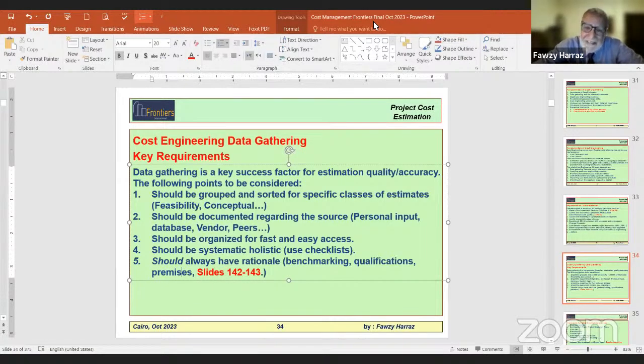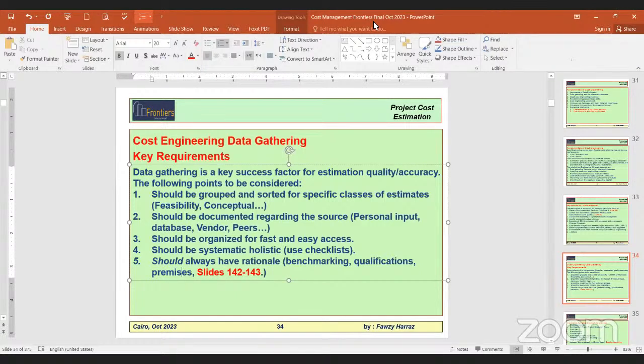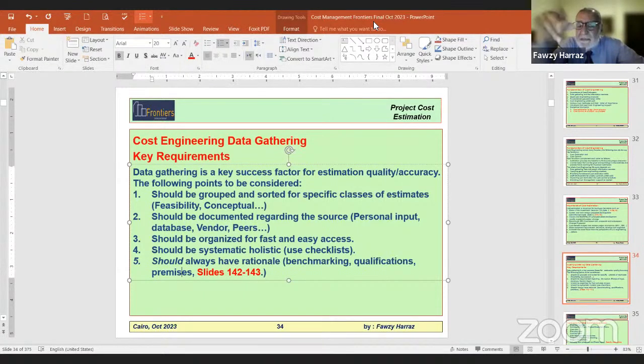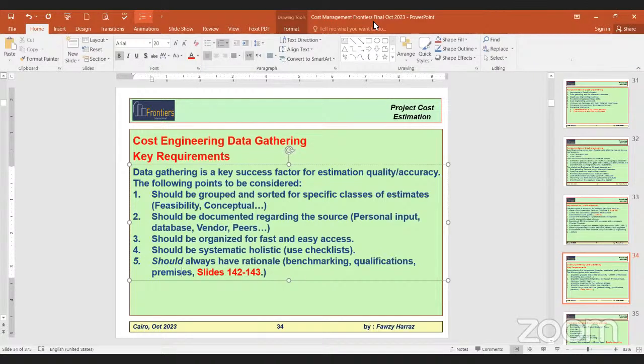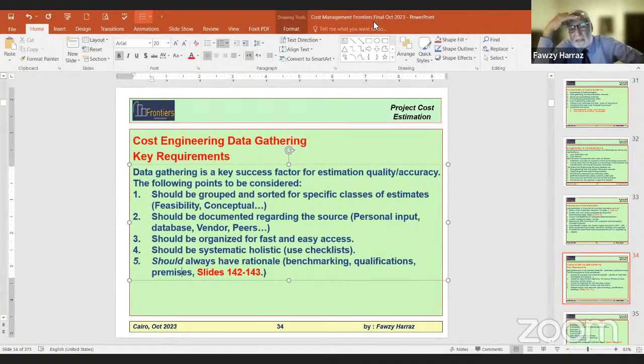Yeah, I know. But some colleague proposed sometimes, I don't know if it's a good idea, to have a standard deviation, like if the bidder is away more than 15 or 20% from the standard deviation, then he's excluded, and this will be well defined in the award criteria before the closure. You mean 15% on the low side, lower than the benchmark. Yes, that's a toxic price, as you said. Yes, for sure. So maybe this is a solution also.